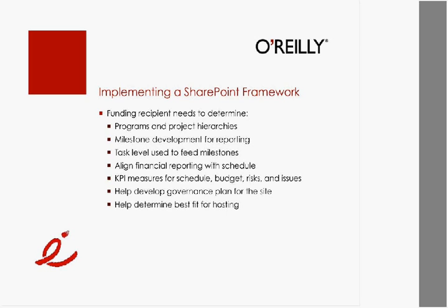And the key is you want it to be consistent. So your reporting would be consistent. So if you're building 10 bridges, what are some of the consistent milestones you are going to use around these 10 bridges? You would need the actual tasks that would feed into these milestones. So you need to define that. So essentially, what you're doing here is you need to define your work breakdown structure, your WBS. You need to align financial reporting with your schedule.